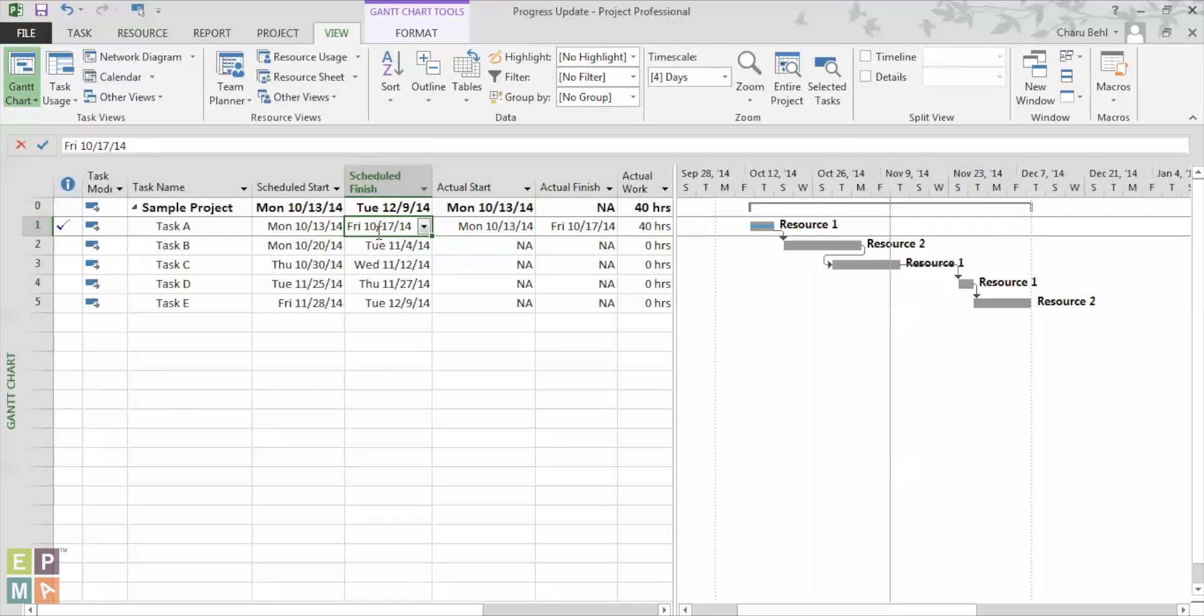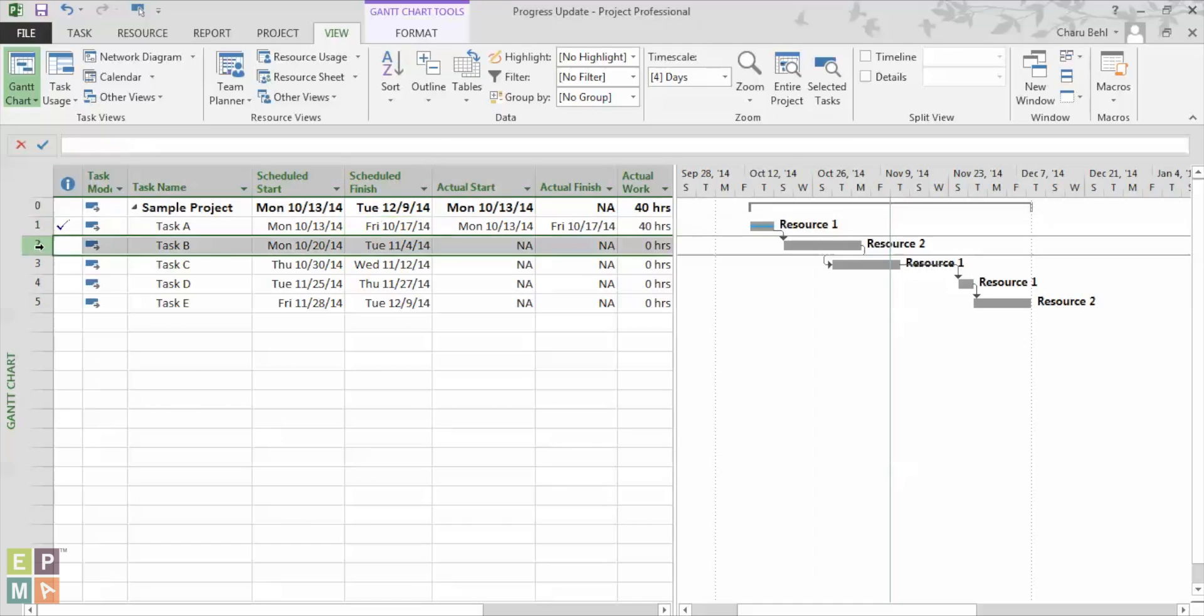The second method is called the actual work and remaining work method. It is a measure of total actual work hours performed to date and the estimated number of work that has remaining. Now again, to update task B, I would want to make sure that my actual start date is correct.